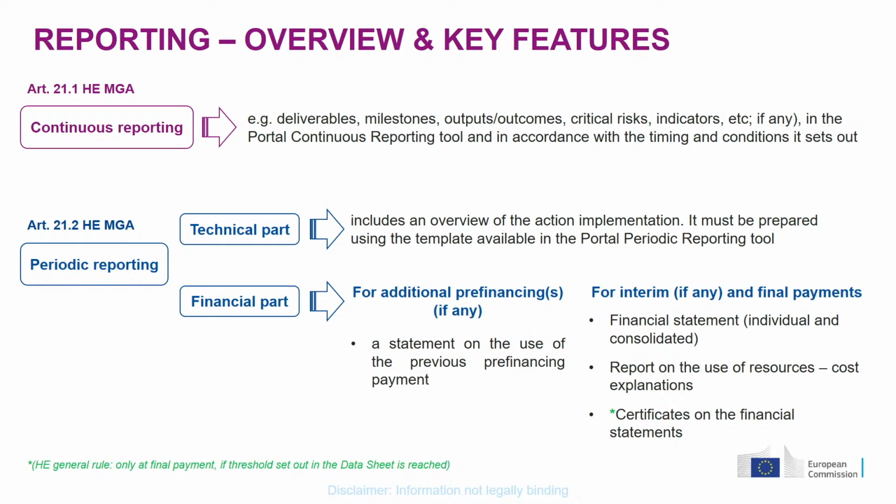This is what you will have to do with this continuous reporting, and regularly you will also have to provide a periodic report. Both are obviously interlinked, in the sense that what you will have already reported continuously via a dedicated module in the IT system about deliverables and milestones, in a structured way with structured tables, you will see in the presentation afterwards by my colleague Petros. This information already provided in continuous reporting will also feed into the periodic reporting, especially in the technical part,